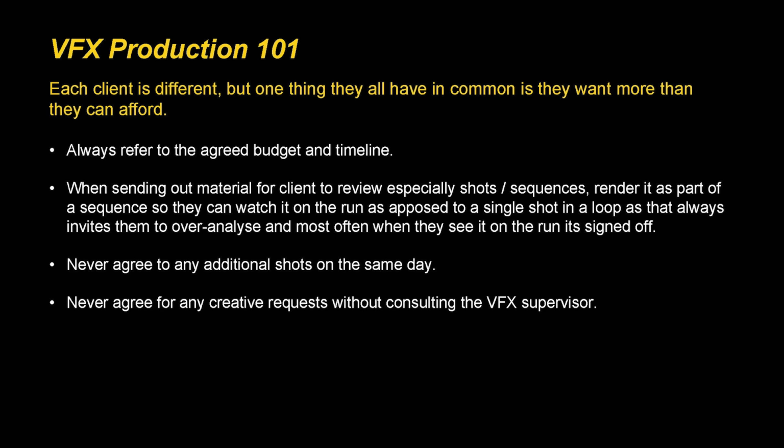Obviously you want to keep the client happy, because your job is to make sure that the client's always happy, so you get repeated business, repeated work that comes back your way. But don't agree on the same day. Just say that you're going to think about it and you'll look into it. You can't promise anything, but you'd surely like to look into it and see what we can do to help. And then obviously consult with the VFX supervisor. Never agree to any creative or technical requests without consulting the VFX supervisor, because at the end of the day, the supervisor wouldn't tell the producer how to budget and schedule. So likewise, you have that respect as well.